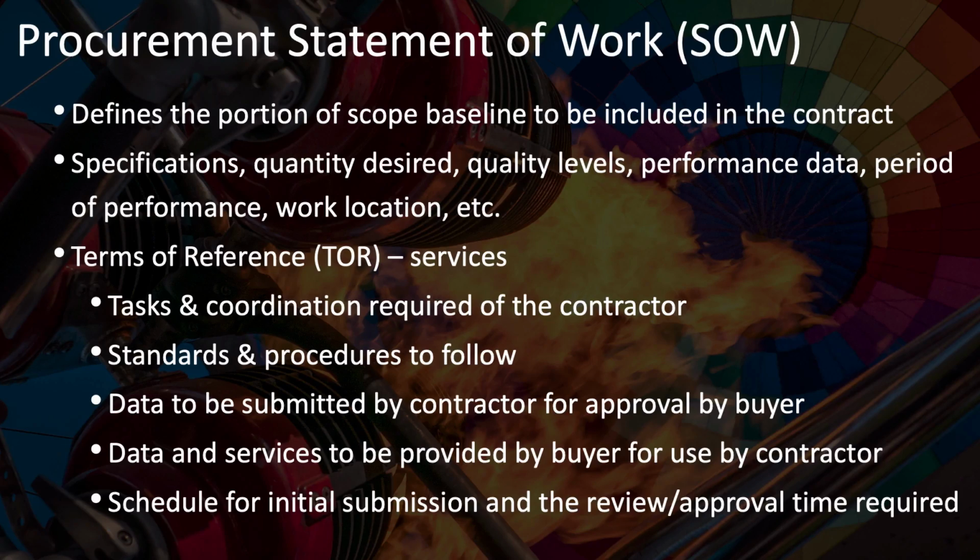Sometimes even simple terms can be ambiguous. I once managed a project that was based on a third-party vendor's software application, and this application needed to be configured to the client's needs, including loading it with the client's existing data and configuring the settings to meet the client's preferences. One of the milestones in the contract, upon which a significant payment was based, was the deployment of the system. Now you'd think that this means, when everything's all said and done, kind of a final deployment. Well, the vendor created a blank, unconfigured version of the system and provided access to a couple of the client's team members, and then sent in a bill for the deployment of the system.